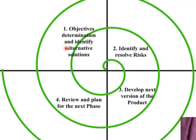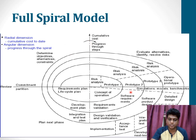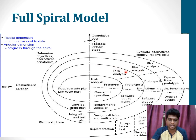In the simplified spiral model, the first stage is to clearly determine the objectives and find alternate solutions to the problem. Then the identified risks are resolved. We develop a new version based on that identification, and finally we review and plan for the next phase. The spiral model has many loops — the exact number is unknown and can vary from project to project.